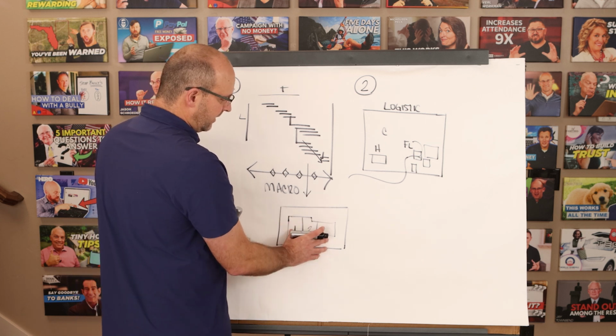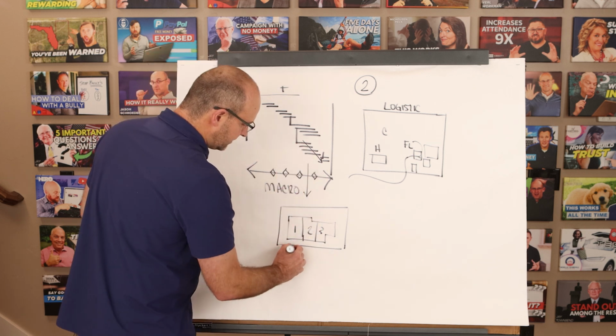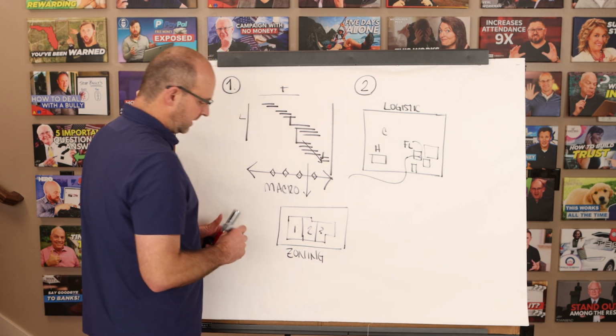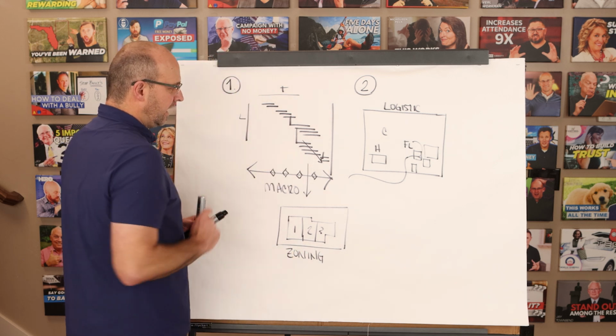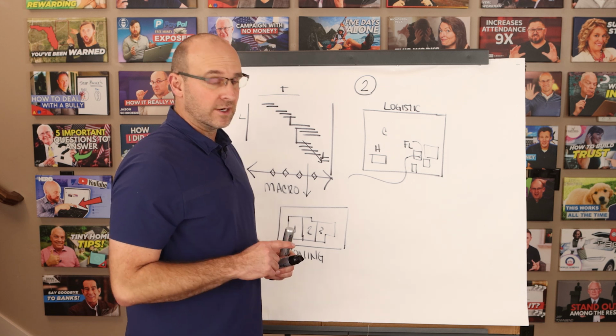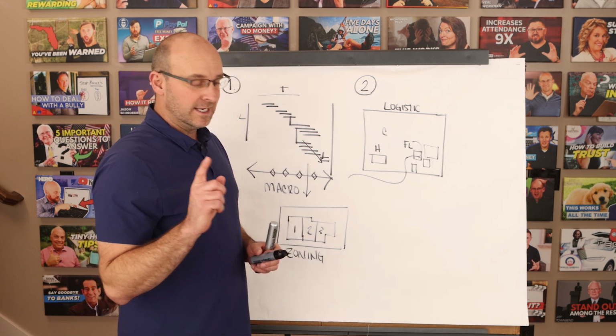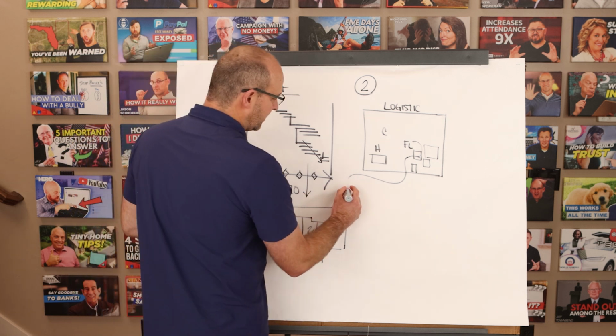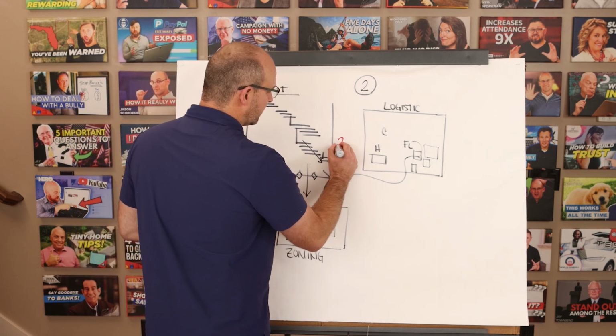But let's say you have a building, you need to understand the zoning, how you're going to break your building up, because that will tie into how many zones you have broken out on your macro level takt plan, and it directly correlates with how fast you're going. And the reason that I mention this is so I could take you to item number 3.